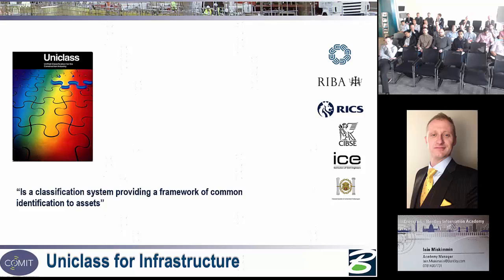And when they bring information together for that briefing at the very beginning, they need to count how many registered trees or grade 2 listed buildings or earthworks or manholes or whatever it is. And if they have to translate every single person's different type of information, there's risk involved. And that risk ends up becoming time, becoming money, etc. as we go forward.